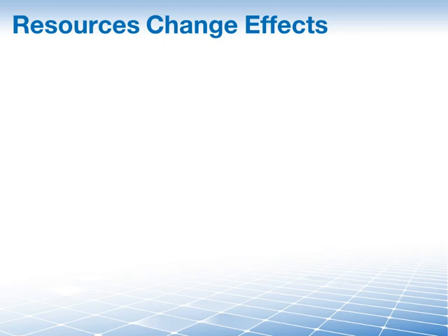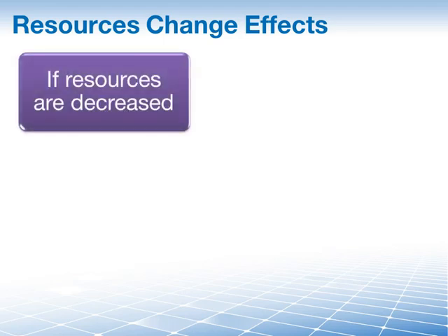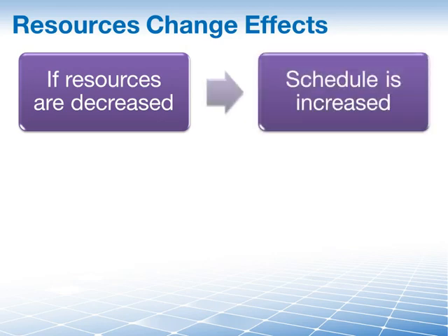your risk. For example, if your resources are decreased on a budget because some machinery is pulled off to be used on another project, then the schedule may need to be extended because it will take more time to complete the original work. You don't have that machine now, and all the labor has to be done manually. All right? So far, so good.